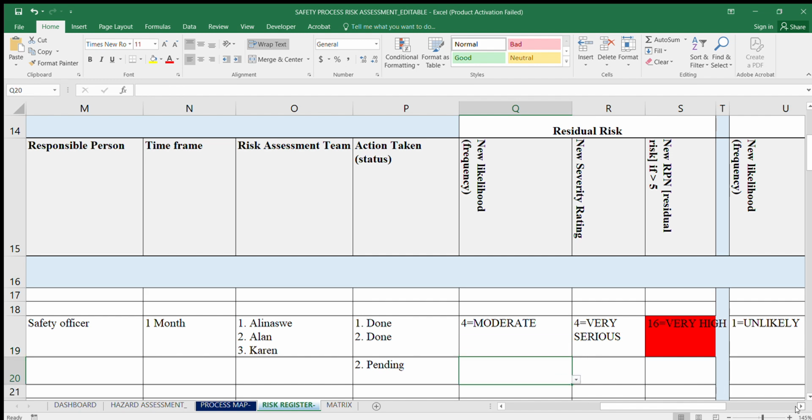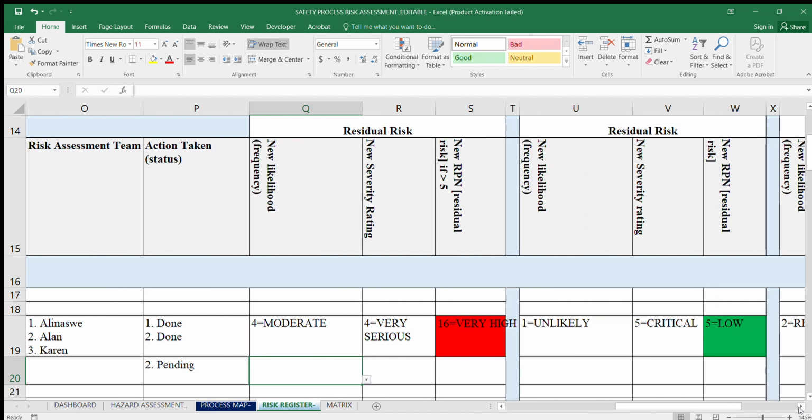This is where you do your next review. Let's say it's been 3 months after you did your initial review. So maybe this is your second review, and in your initial review, you found that there were incidences of that particular scenario. So in the initial assessment, your risk was moderate. But then in your review, you find that the risk has increased because there have been incidences of that particular scenario. So now your risk increased.